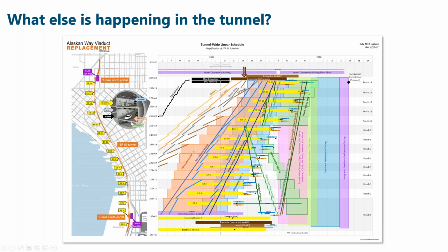This is for the lower deck here. So you drive in, place the deck, and you back out, right? And then, so we did it backwards this way, and then came up here and finished backwards the other way. All the rest of this time here with these large block shapes, this is for commissioning, testing and commissioning time to complete the tests.